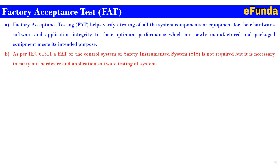As per IEC 61511, a FAT of a control system or a safety instrumented system is not required, but it is necessary to carry out hardware and application software testing of the system. The FAT is a practical way to test and verify the proper operation of the safety instrumented system — the control system — which may also be applicable for DCS, PLC, etc. systems.